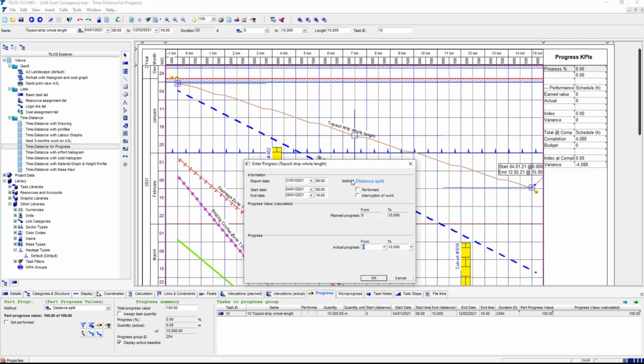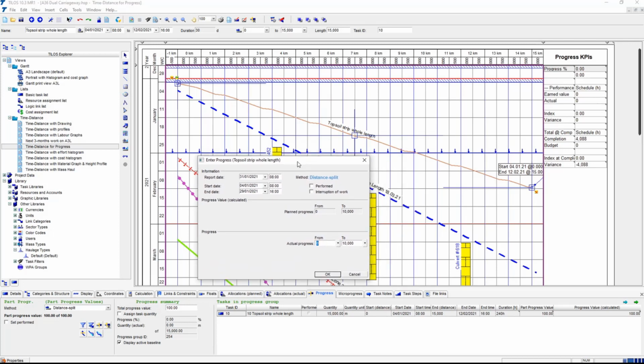This is where it can get really interesting. In fact, we couldn't get into the first bit of the job because access was denied, because they haven't yet got permissions. So we didn't start until 1K into the job, and that disruption means we've only got to 8,450 meters along the job. So you've got a physical measure about where you got. You're not arguing about whether you've done 37% or something.